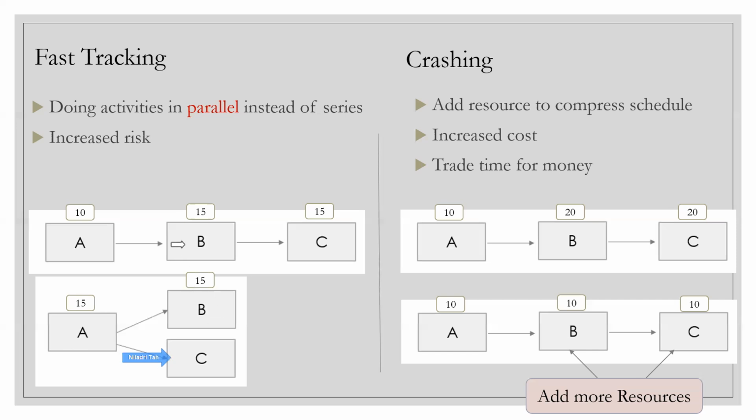Let's say activity B has a risk and you plan to finish B completely and then push on to C, right? Which is fine. But let's say activity B has a risk and C has a risk as well, the inherent risk of the activities. Then you have to focus on B and C to register and mitigate the risk at the same time.